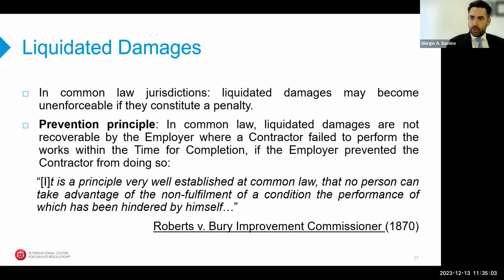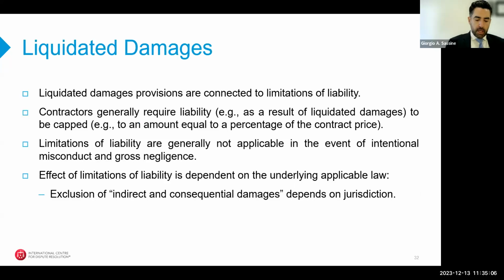Yeah, that makes sense, more of an equity argument. Matilde, are there certain ways that a party can escape the limitation of liability clause or the liquidated damages provision? Yes. Generally, courts tend to give effect to the caps or limitations on the amount of recoverable LDs provided under the contract, but these limitations of liability will generally not be enforced in cases of gross negligence, willful misconduct, bad faith, fraud, or similar concepts. And the elements of each of these concepts need to be proved in accordance with the specific criteria under each of the applicable laws. Thank you so much.